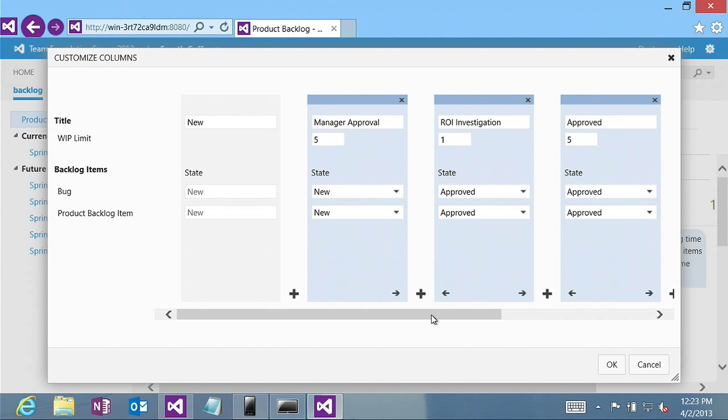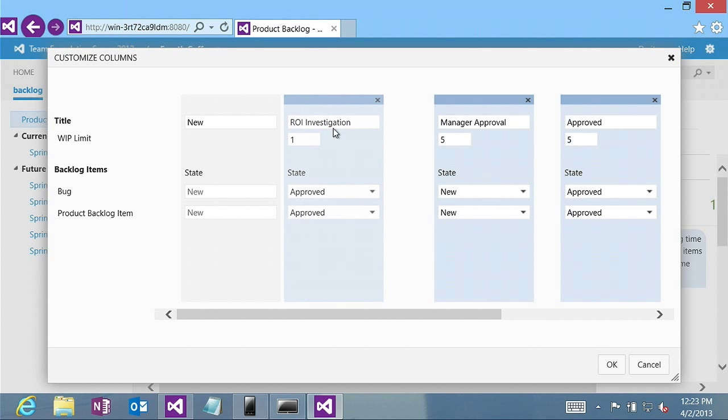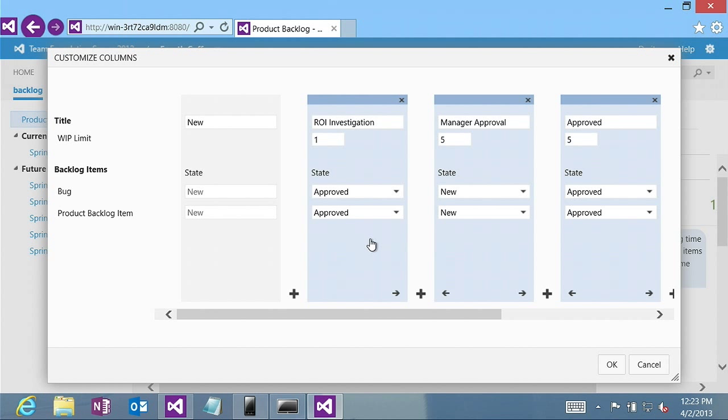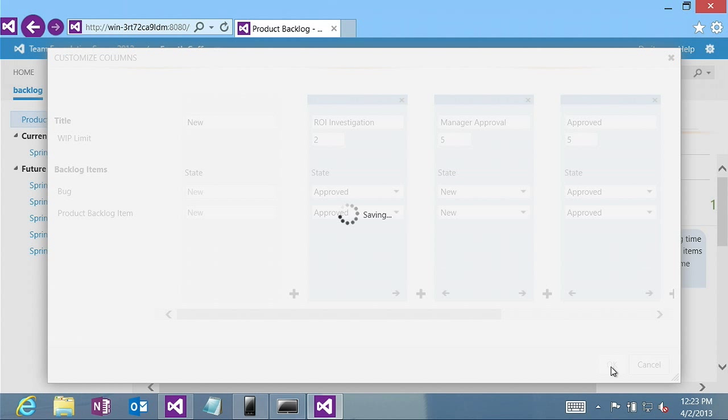And also you have the ability to customize the maximum weight before you get warnings from a column. So one of the swim lanes, columns, might have a certain level of items that it can have. Let's put this back the way it was before. And notice the 1 over here. 1 means as soon as you have 1 item, you're filled. Maybe you have 1 person who can only handle 1 thing at a time. And that's probably not the best way to do things, but reality is reality. And that's your weight, or maybe it's 2, right? Maybe you have up to 2 items in this stage of your organization. So we'll set it to 2, hit OK.